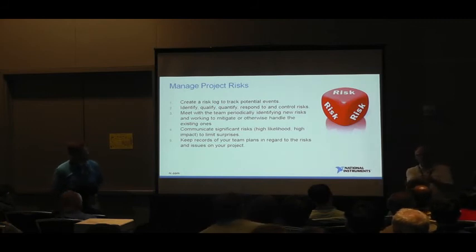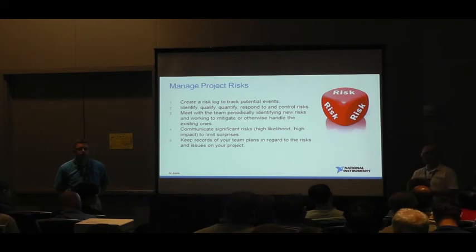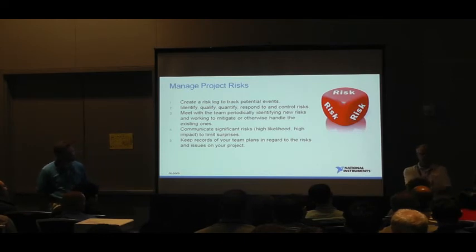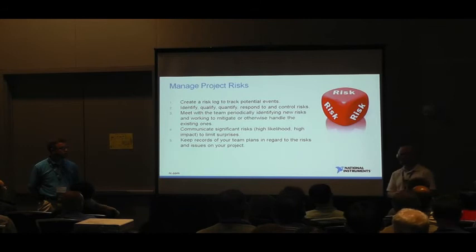If those interim dates start to slide, you end up compressing the schedule and you're getting all these things you have to get done right at the last minute, and it's very difficult to do. So I would recommend having the whole team involved with making sure they realize what the interim milestone dates are, so that everybody's pulling together to meet those interim dates, for a higher chance of success of meeting that final date.